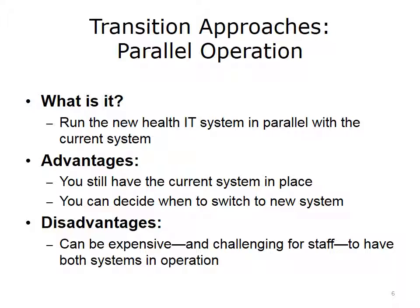There are disadvantages, as parallel operation can be expensive. It also can stretch out the time period for moving to the new system through a very drawn-out process of transition. All the while, this is placing a double load on the computing infrastructure. The staff may be challenged in determining how to do their work when they have both systems in operation, so careful planning and training is needed. When you have confidence in the new system and feedback from staff members tells you that it is working well, you can plan to phase out the current system, typically in stages, until only the new system remains in operation.